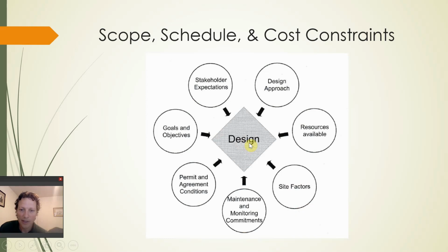Site factors, obviously, everything you learn from your site visits and your SWOT-C analysis are going to inform the design. Maintenance and monitoring long-term commitments, that's super important, because you do not want to build a project that's not going to sustain itself naturally. It's very rare that you expect to have funding to do heavy, intensive maintenance of the site indefinitely. So maintenance and aftercare, things we're going to talk about later in the course, the things that come after project implementation, you still want to anticipate how that's going to inform the design.